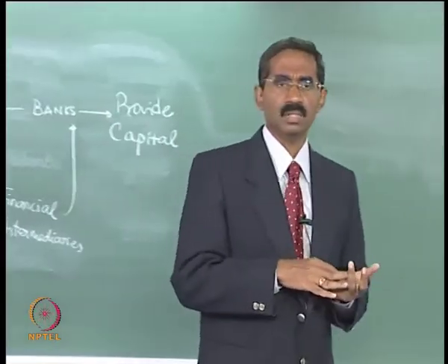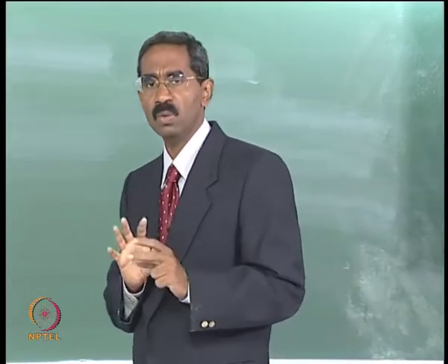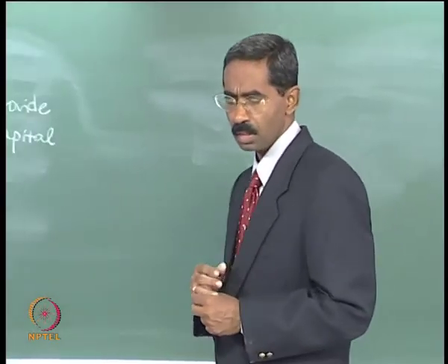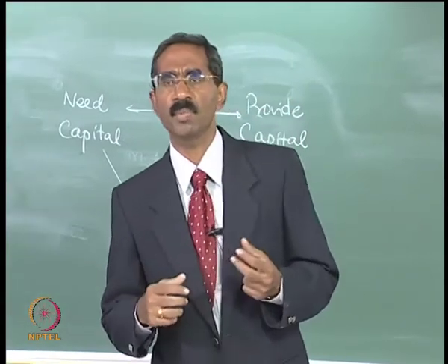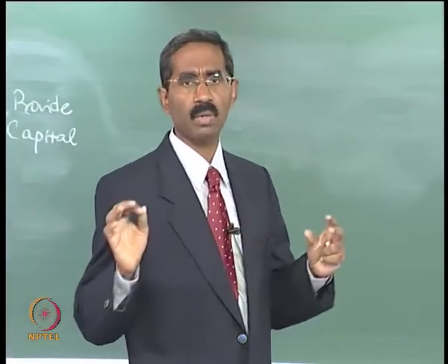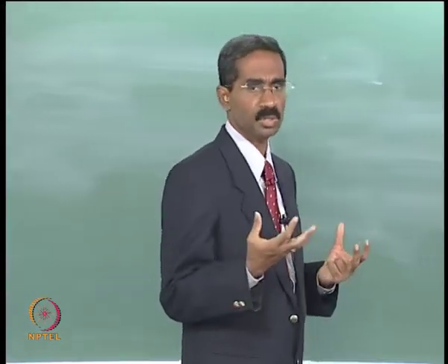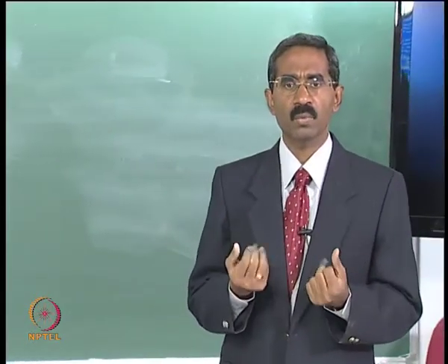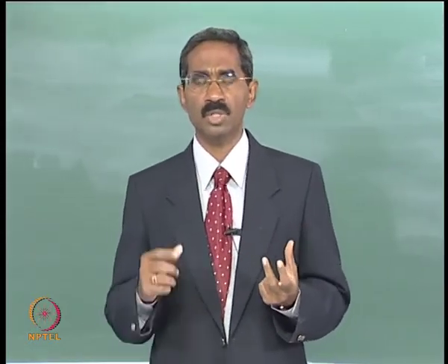The second part is, once you have identified the financial feasibility, you should also look at what the different project risks are, and the advisory services company will also help to put together a risk management framework that can address all these risks. An advisory services firm is also expected to assist the sponsors in preparing and negotiating the major contracts. Remember, contracts are a part of a risk management framework, and since advisory services include identifying the risk management practices, they will also be assisting the sponsors in negotiating major contracts.